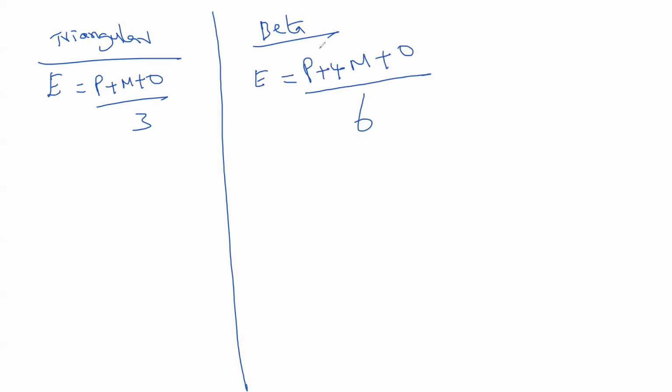That's it. So for the PMP exam, if they give only PMO values and they are not specifying what distribution to use, you will use triangular distribution by default, it's a simple average. If on the other hand they say beta distribution or weighted average, then you will go for the beta distribution formula.